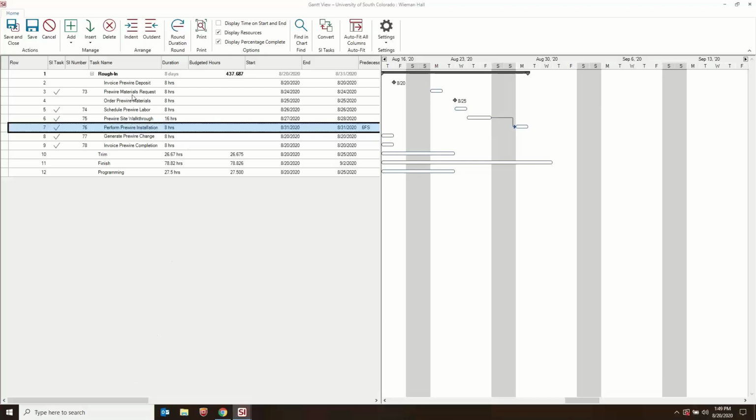And then the key thing that you would want to do there is then just delete them out of the Gantt view here. Once they're deleted here, the link is broken. You can move your start and end date out there in SI. So only while these exist and are linked do they have to be controlled by the Gantt view. So just keep that in mind, like kind of a little Easter egg there, an extra feature that came along with building this Gantt chart and the functionality that we spec'd for this.